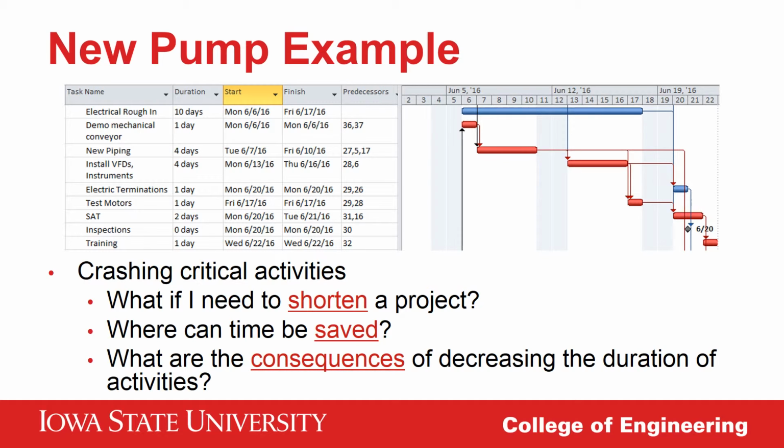But since this is a recording, I'll tell you that I see weekends. This work is electrical and mechanical in nature. Those types of contractors have multipliers that are pretty effective in modifying costs for weekend or overtime work. They even adjust for productivity losses of each worker when the days are more than 10 hours long. So I can move demolition from June 6 to June 4, and the same for activities the following weekend.